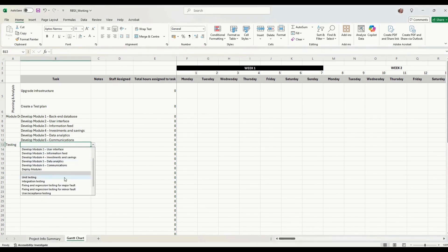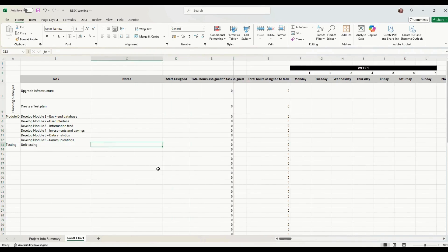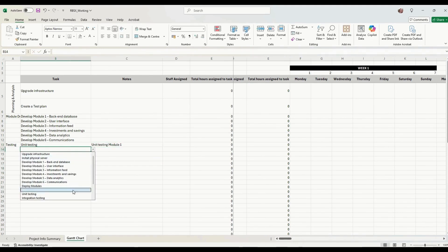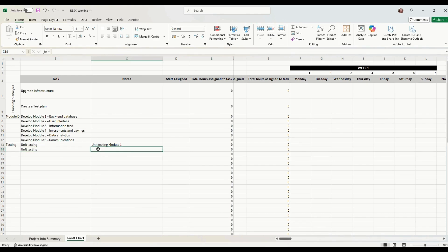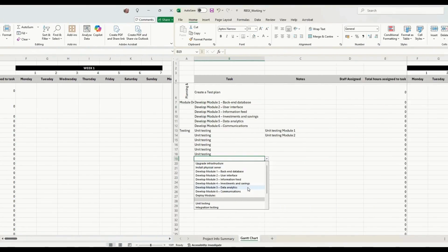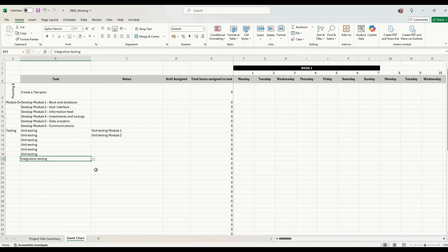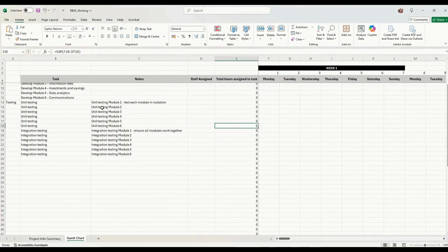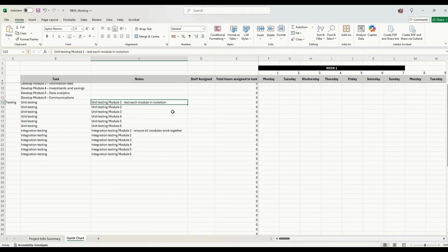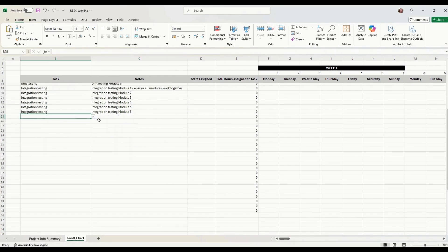Each module needs to be unit tested, so in our notes section we put 'Unit testing Module One'. Each module needs to be tested in isolation. After unit testing we've got integration testing, which needs to be done for each module — we need to check that Module One works with modules two, three, four, five, and six; that Module Two works well with the other modules, and so on. So we need to do six of those.